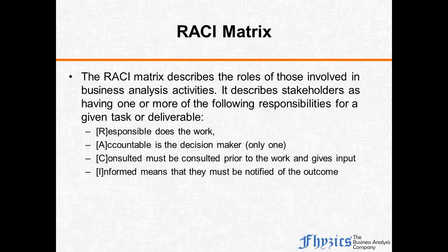The RACI matrix helps us organize the level of engagement of the stakeholders in this particular project. Whenever I want to go for an approval, I will not go to the responsible people. I will go to the accountable people. Whenever I want to understand how the real work is done, I will go and talk to the responsible people, right? So it gives another perspective about the stakeholders.